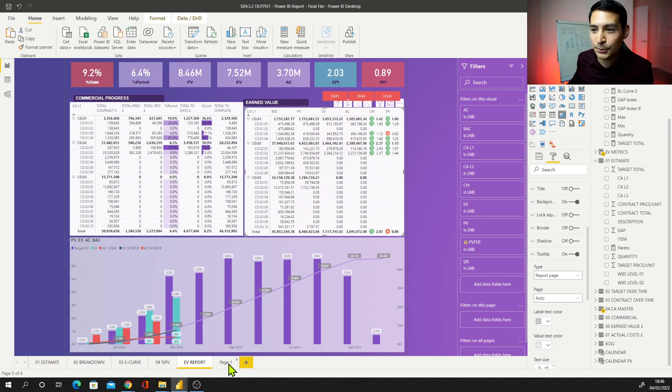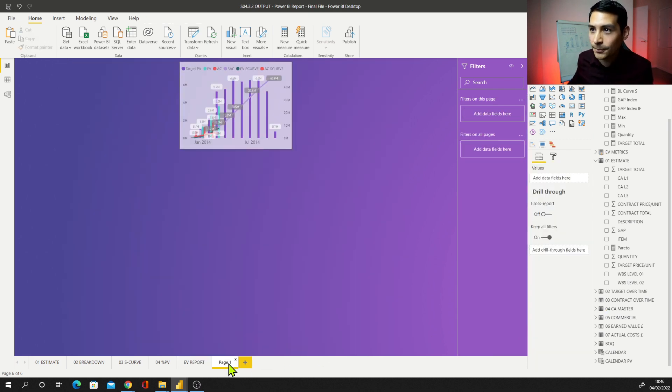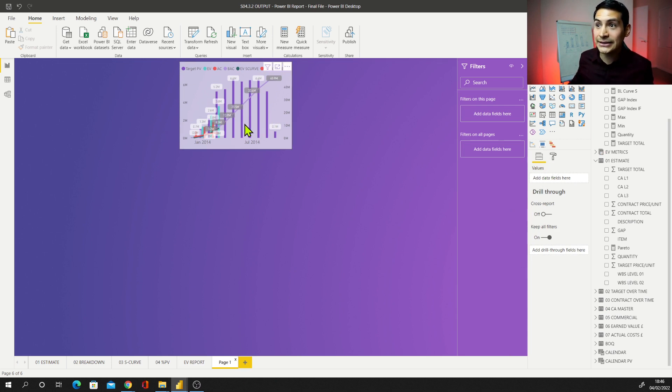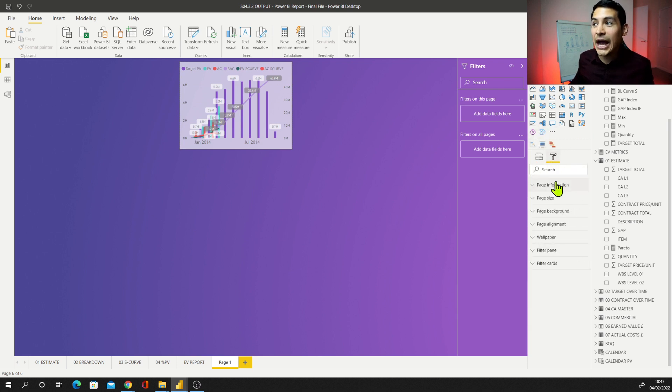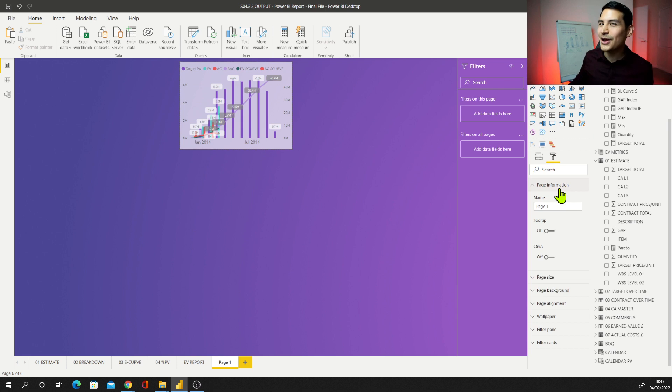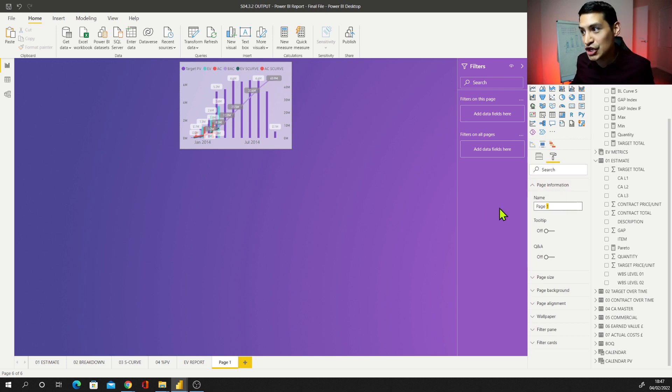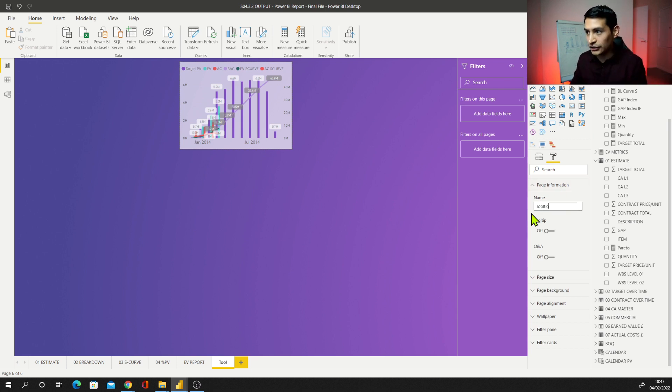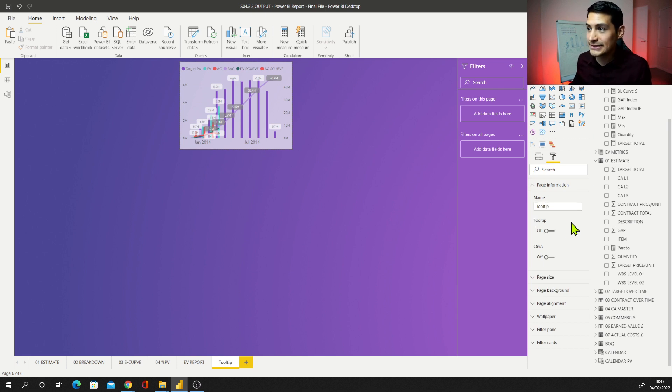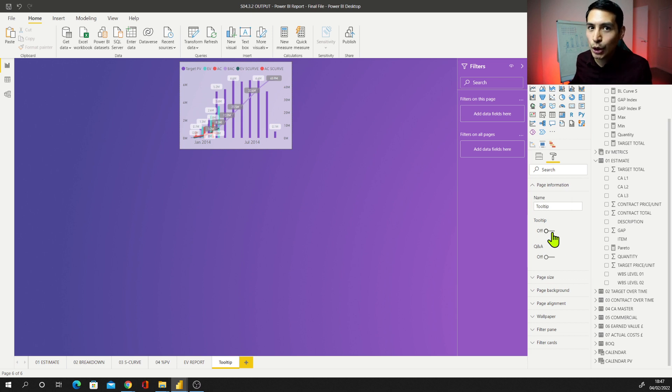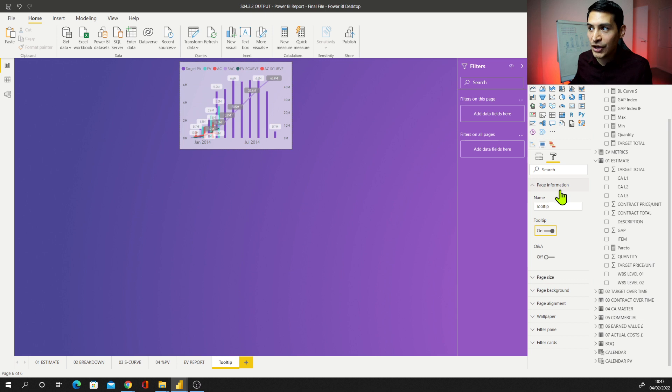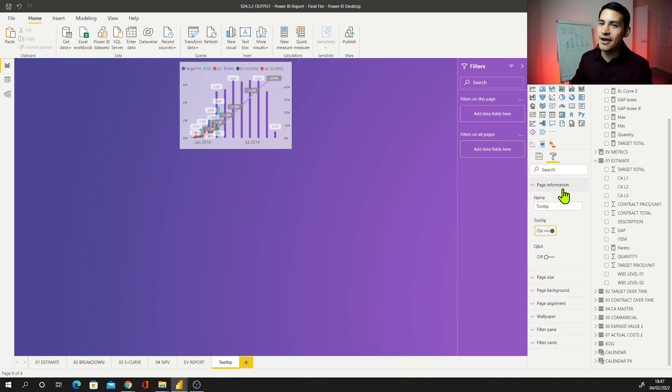So I go back to page number one and I go for, without selecting anything, this is just blank canvas. I go to the format and then under page information, that's the one I missed. I can change the name. Let's say I want to change this for tooltip, just to recognize that. And this is the one I missed. I didn't toggle on my tooltip setup under my page information. Bam! Now we have that.